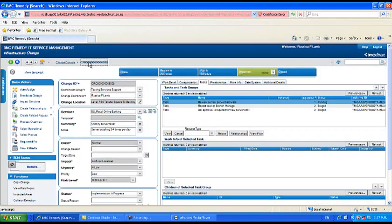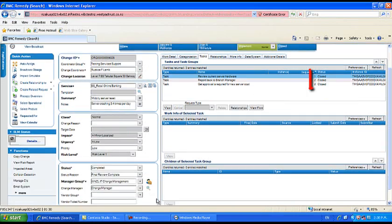Here's a tip: sequential tasks cannot be closed unless preceding tasks have been set to a status completed.